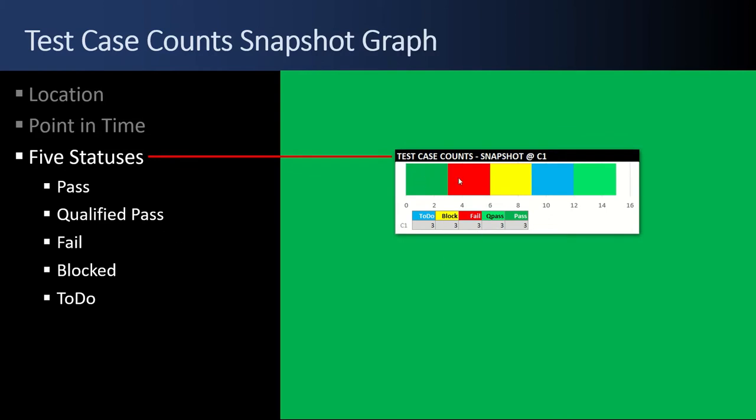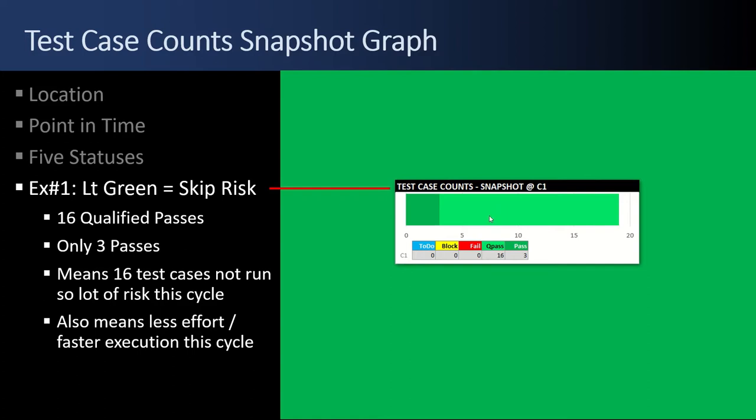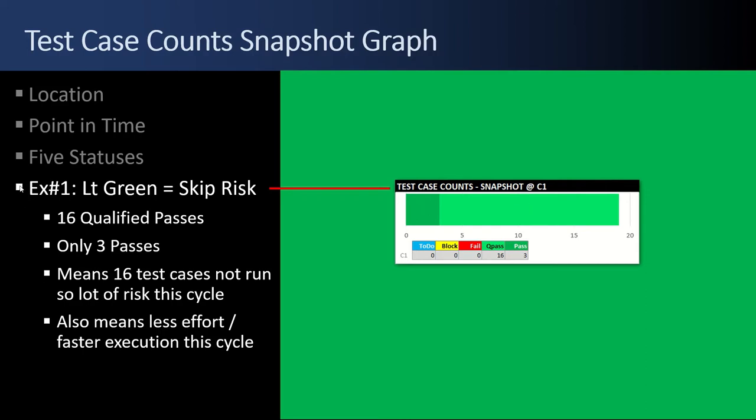Pass is dark green, red is fail, yellow is blocked, blue is to do, and the lighter green is a qualified pass. For example number one here for the test case count snapshot graph, there are 16 qualified passes. We've effectively skipped and didn't run any test cases. The downside is the risk. We didn't test these. The upside is that we skipped these. We put in zero effort executing those tests. So it's a balancing act.